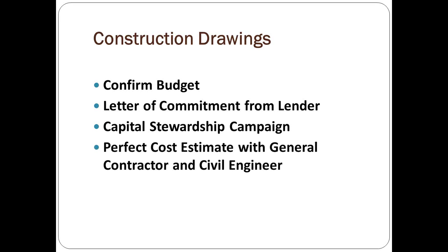Do those two add up as you look at how much you have on hand, cash on hand, how much you're able to raise, how much you're able to borrow, minus your debt? Does that fit within the budget of your proposed phase 1 from your master plan, so that you can safely release them to do the drawings, let them do their work, so that over the next 3 to 6 months,